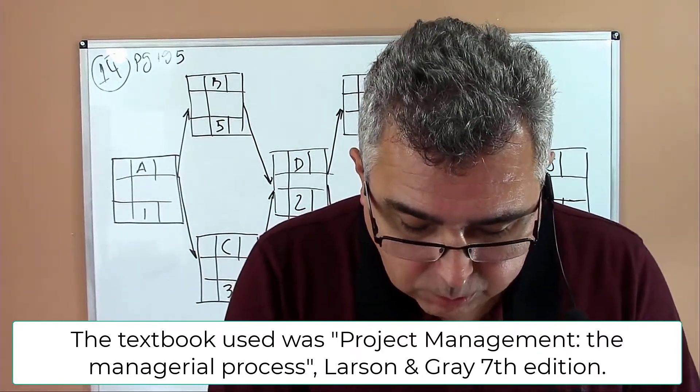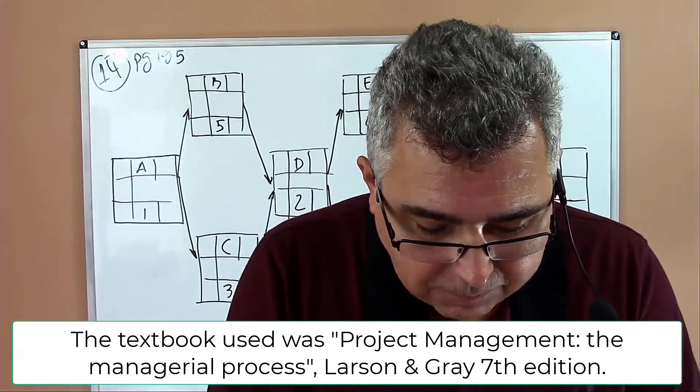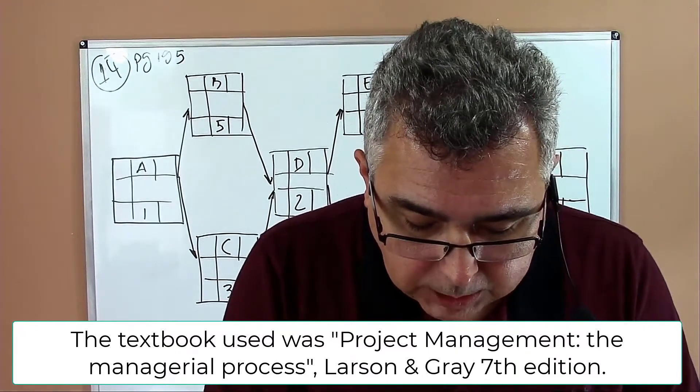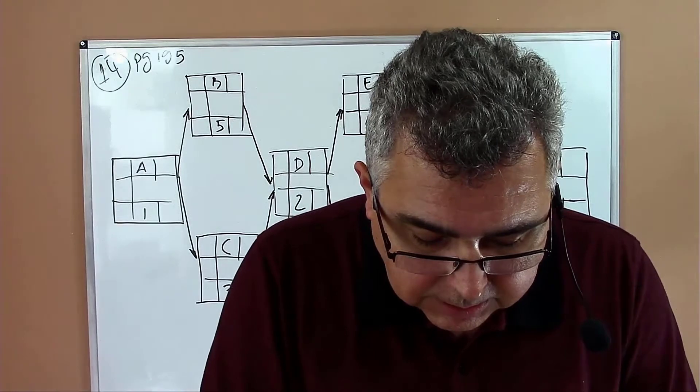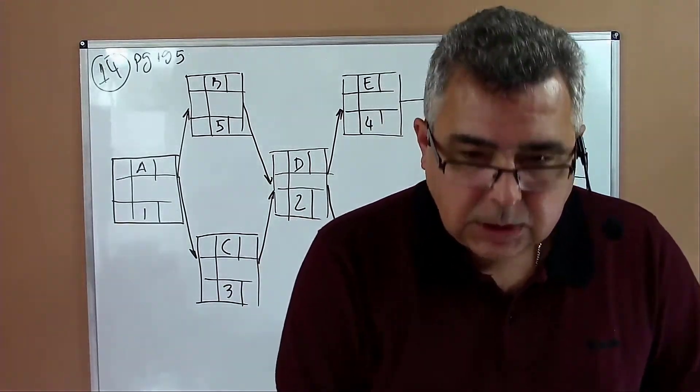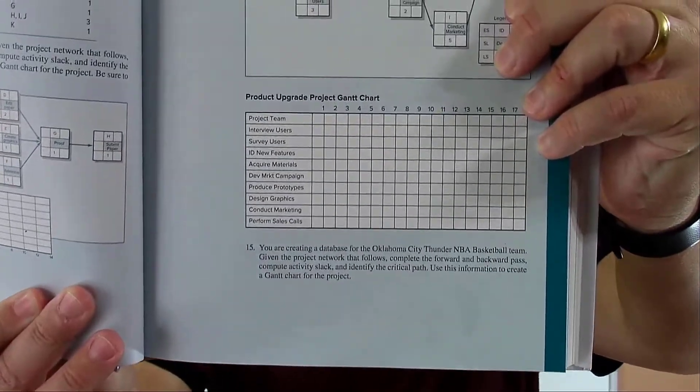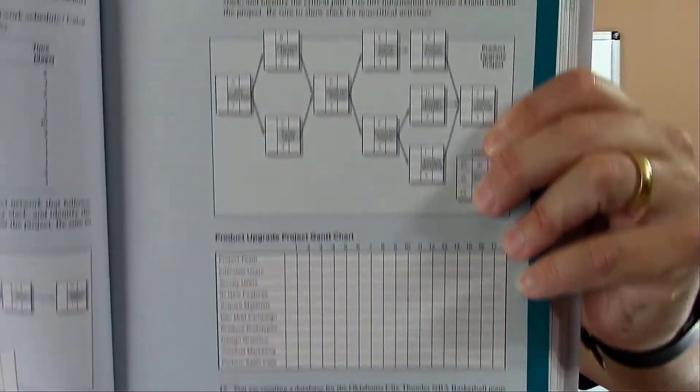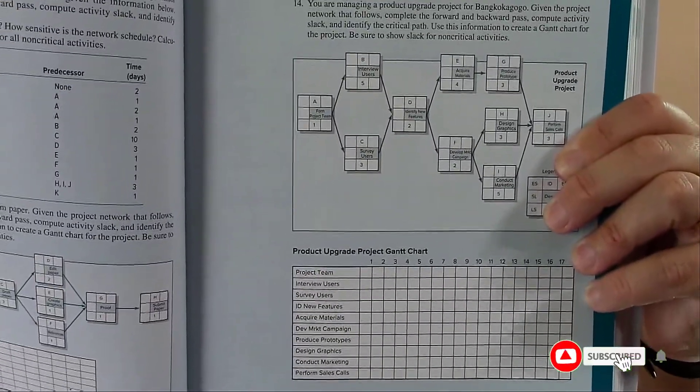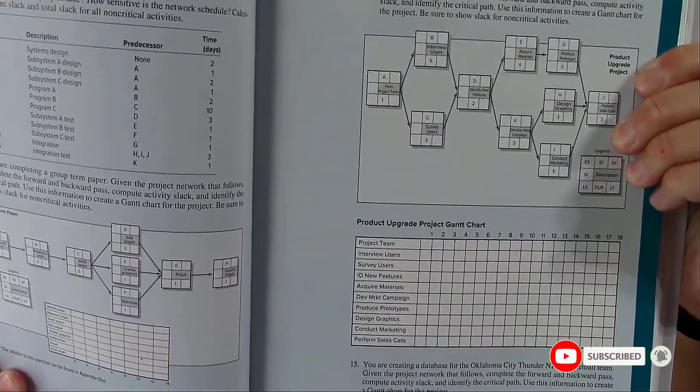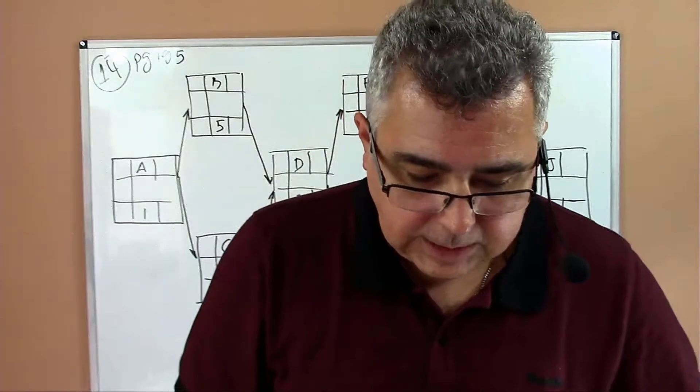Given the project network that follows, complete the forward pass and backward pass, compute activity slack, and identify the critical path. Use this information to create a Gantt chart for the project. Be sure to show slack for non-critical activities. In the book you have a table on the bottom. First we'll be computing the network, then we'll be transferring the dates to the Gantt chart. That's the problem.